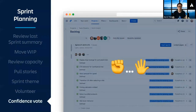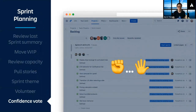Lastly, we do a confidence vote as a gut check or a mini inspect-and-adapt exercise. Everyone holds up their fists and votes — five fingers means you are 100% confident we can complete our sprint commitment, and zero fingers means zero confidence. If a team member shows a relatively lower score, we can take note and adjust the sprint plan accordingly. After this, we're done with sprint planning and we can start the sprint.